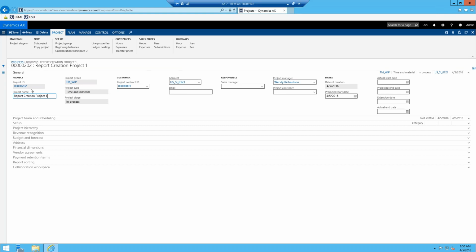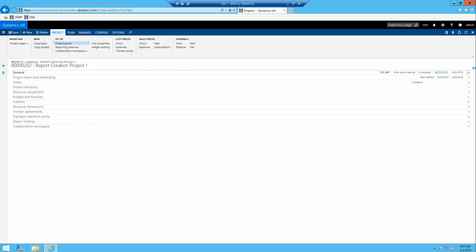First of all, I've gotten this question a number of times. People that are familiar with budgeting will come in and create their project and then try to go enter their budget. The first place to enter your budget is the Plan tab, then the budgeting section, and then Project Budget. You'll notice this is grayed out, and it's grayed out for a good reason, because we haven't enabled budgeting for this specific project.